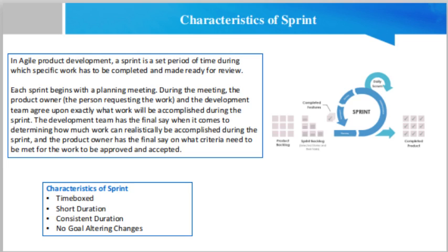Quicker feedback. Each sprint creates a potentially releasable increment of the product. It means that the product owners and stakeholders have the opportunity to provide feedback within 1 to 4 weeks. Therefore, if anything is going wrong and needs a course correction, it can be taken up quickly. Compare this with traditional project management, where business users would usually look at the application during the UAT phase. Naturally, by this time, we are already too late to do any course correction.